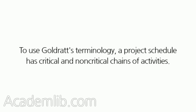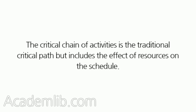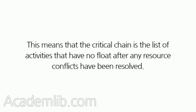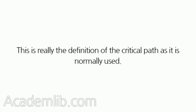To use Goldratt's terminology, a project schedule has critical and non-critical chains of activities. The critical chain of activities is the traditional critical path but includes the effect of resources on the schedule. This means that the critical chain is the list of activities that have no float after any resource conflicts have been resolved. This is really the definition of the critical path as it is normally used.